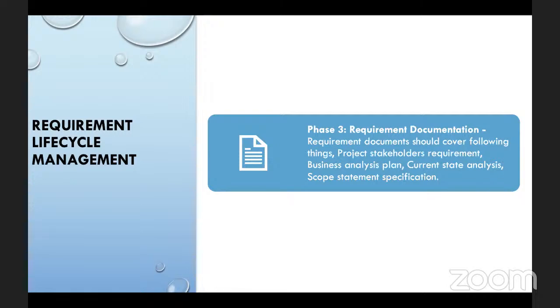There are all types of documents that need to be prepared, and one very essential one is the business requirement document. So what goes in the business requirement document? There's going to be the project overview or the feature overview. You're going to have revision history or approvals, people that are signing off on that requirement. You will see things like the business processes that are being affected. You will see things like risks. What are the risks with this feature?